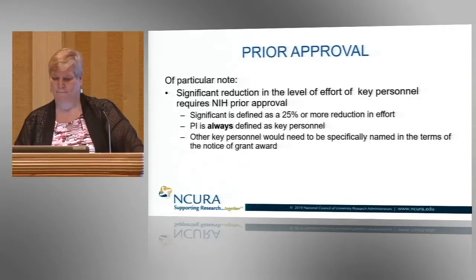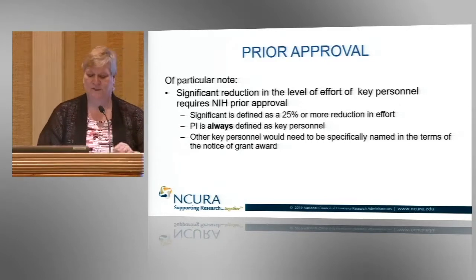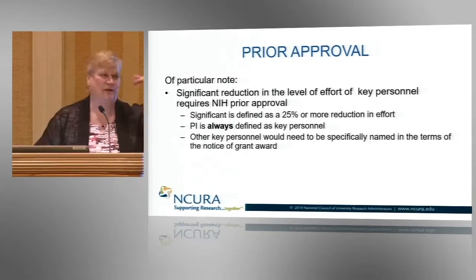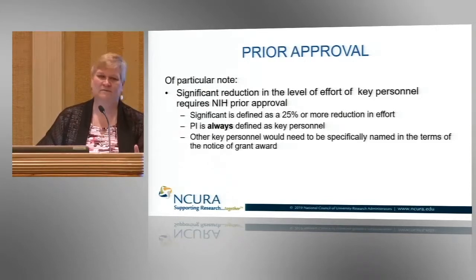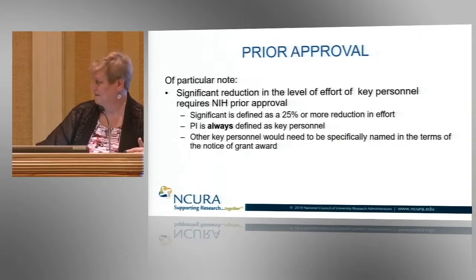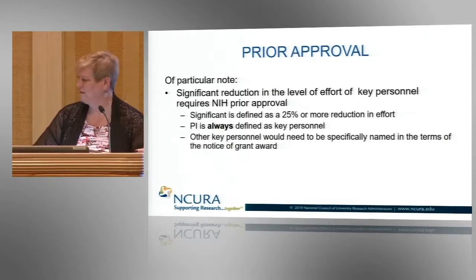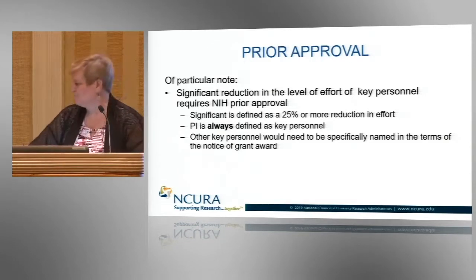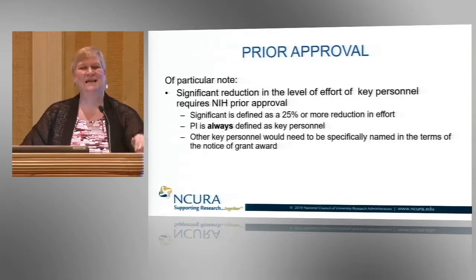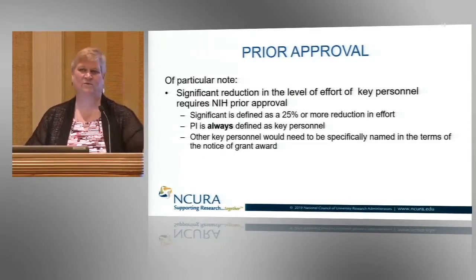Okay, I think you've touched on this a little bit, but we have a question on what is a significant change in the budget that calls for resubmission of the budget? Okay, and this is a general rule for any significant change: 25%. That's our threshold to indicate that there's been a significant change. It's not a hard and fast threshold. It's not in policy that 25% actually says significant, but it's an indicator of a change in scope. Okay, I need to go find that. But that's the threshold that we use as a general rule of thumb.